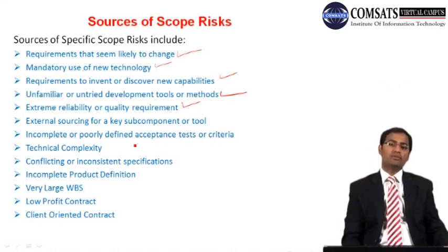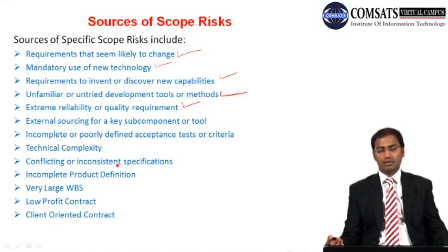Or you have to develop different components of one software, and one of the components you have outsourced to this gentleman X, and he is not giving it to you on time. So your whole project team is waiting. And then when they come up with the software, you find that it is not compatible. The software or platform this person was using is not compatible with the one your main project team was using.